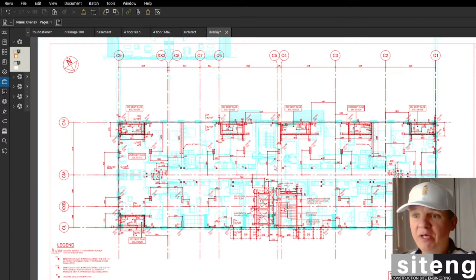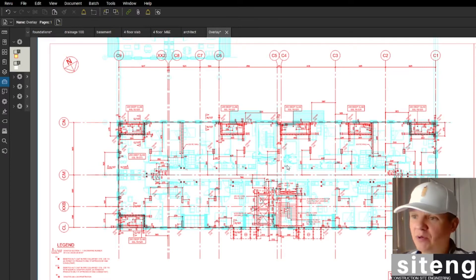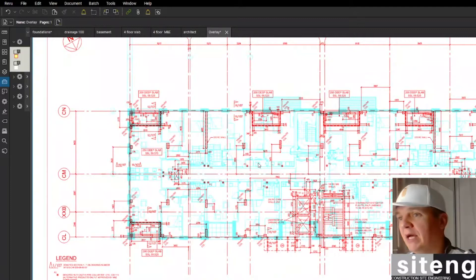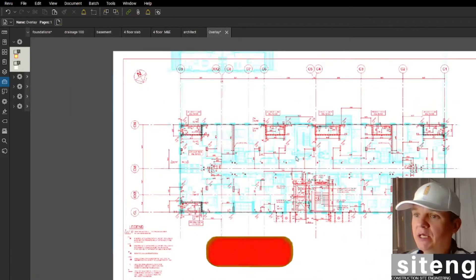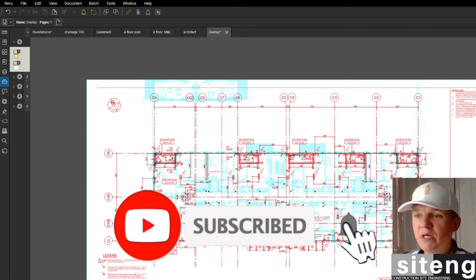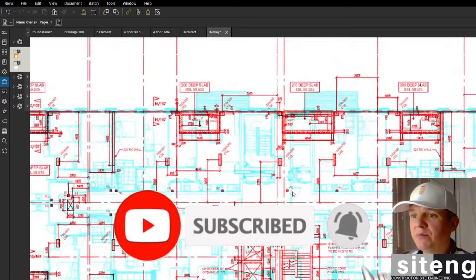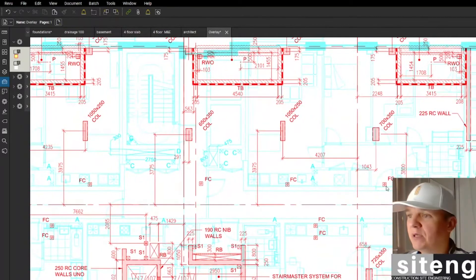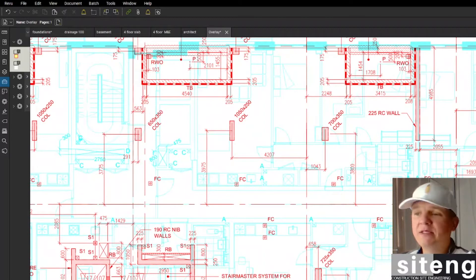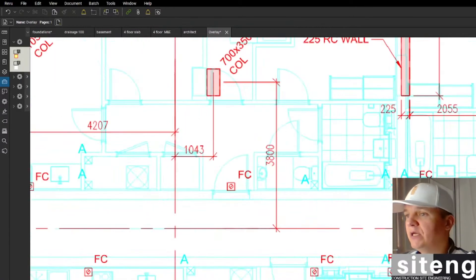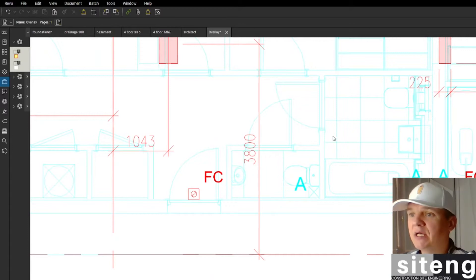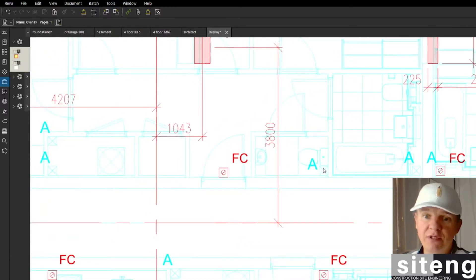In the last video we actually overlaid these two drawings — the general arrangement structural drawing for the concrete, which is what we're going to be setting out, and then we have the M&E drawing. What we're going to do today is address a discrepancy between the penetration shown on the structural drawing and the M&E. We're going to raise an RFI.